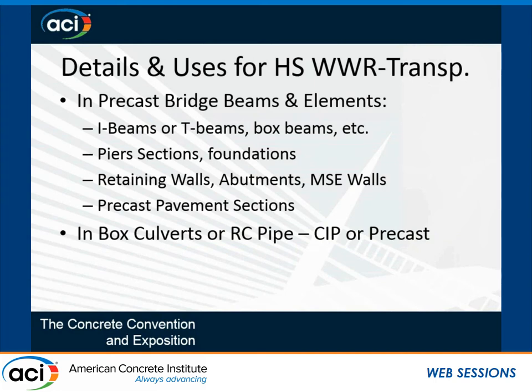A lot of times we might need a little bit of lead time on what you need, because there are a lot of construction projects and a lot of lead time scheduling. We need time to get the wire ready, put it on a machine, weld it up, and make the configuration you need, bent, flat, whatever. We need to drop it in place and pass the pour.